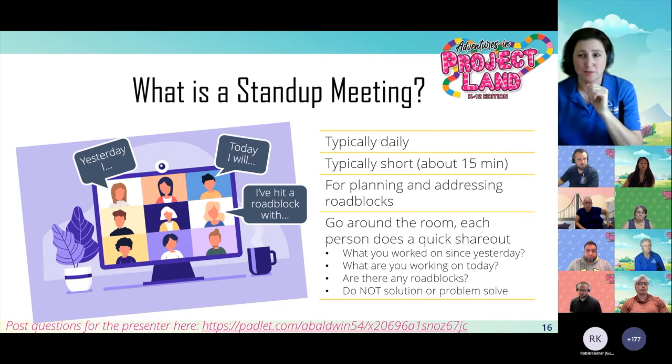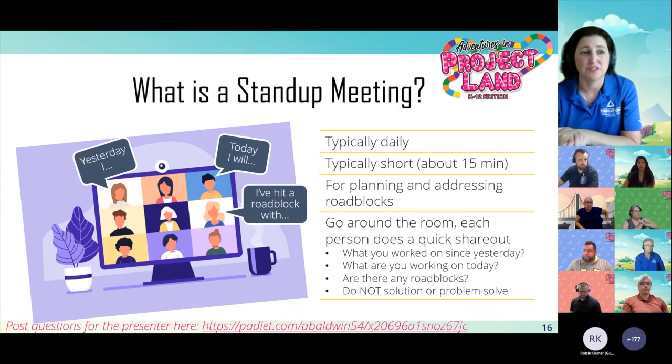And then honestly, the most important question is, what roadblocks are in your way? You as the project manager or project team leader, your primary role is to eliminate those roadblocks. You can't eliminate them if you don't know what they are. So a stand-up meeting is a great way to hear what's happening with your project team and what's standing in their way.